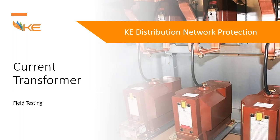In this training, we will learn different techniques and procedures that we can adopt. We will learn the benefits of commissioning. Commissioning is basically an activity on a dead or isolated system. First of all, you will be in an isolated position. Make sure that the panel isolation follows SOPs and all safety measures. When the test is completed, then you will go for energization. It will be a very good session and we will be learning together.